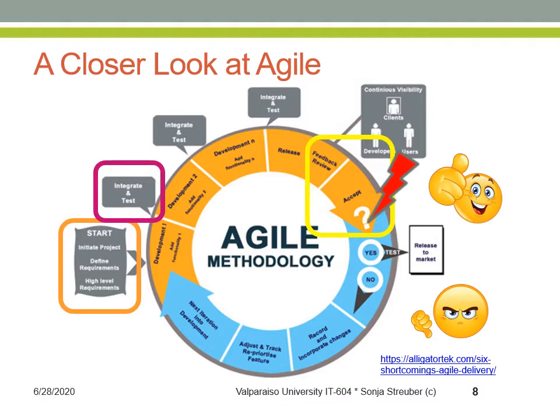Any of this rework, which you're seeing on the bottom blue part of the arrow here, will have to become part of the next sprint. Obviously, if you have any rework and fixes to take care of, that limits the amount of new user stories that you can take on for the next sprint, even if the product owner insists that the normal number of stories will have to be built.